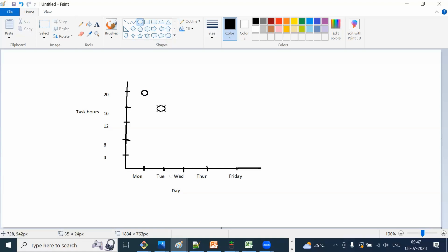Now the same thing applies with Wednesday, my dear friend. How much will it go? 12 hours. Thursday morning, how much will it go? 8 hours. Friday morning, how much will it go? 4 hours. And Saturday, obviously, it will be 0. Right? So a burn down chart is nothing but...